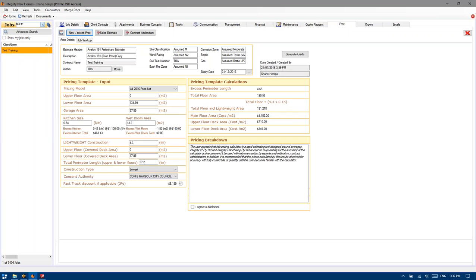We'll just hit copy. As you can see, it's brought everything over. First thing and probably the most important is this expiry date. If we hit these three little dots, it will reset it to 30 days from today. Then the second most important would be to adjust it to your relevant consent authority to apply the applicable loadings.